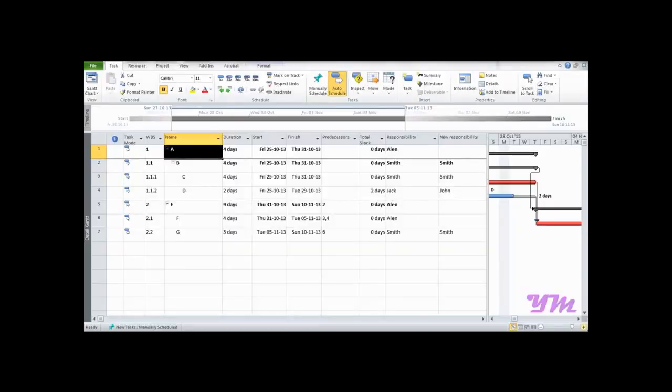Module 7, Recurring Activities. Say a specific activity repeats on a specific day of the month, day of the week, day of the year, or specific time frame during the year. Then we need not enter that activity again and again. Microsoft Project 2010 has a feature named recurring task in which we can enter the task which recurs and mention the interval of its repetition. It would then appear in our task list automatically and we need not enter all the values manually.